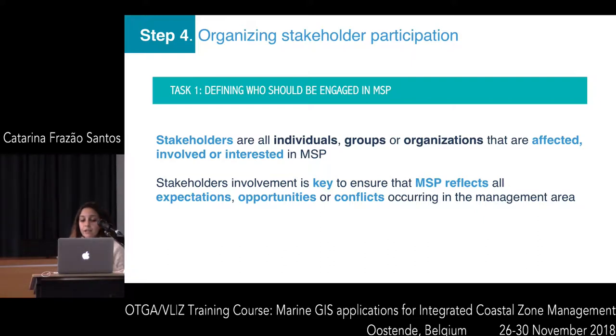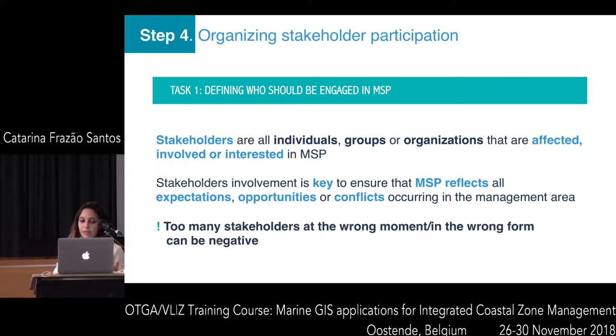On one side, stakeholders' involvement is key to ensure that marine spatial planning reflects all the expectations, conflicts, and opportunities that take place in a management area. Many times, stakeholders are not properly engaged, and this is a real problem because then plans are not enforced or complied with. If stakeholders are involved from the beginning, some issues might never appear and can be avoided.